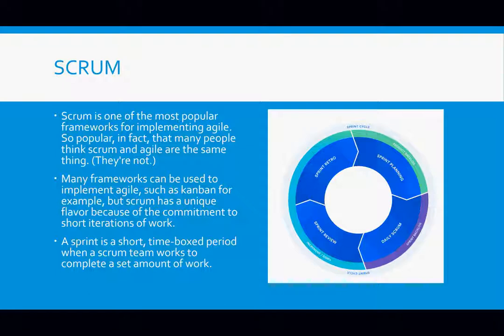When you work in Agile and you are using Scrum, you will have a time allocated in each of the sprints. Your sprint could be 2 weeks, 3 weeks, 4 weeks, or 5 weeks. They're different flavors, but the most common one that you will hear about is 2-week sprints: short, committed work, so that within 2 weeks you are able to deliver something. What you commit to the sprint is something that you will be able to deliver within 2 weeks.